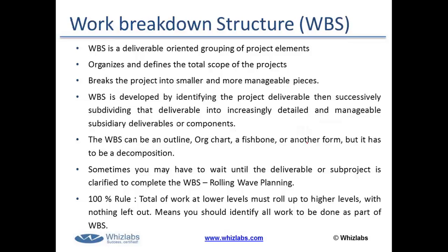Now, the construction work can be further broken into, let's say, construction of the ground floor, construction of the first floor, construction of the third floor, and so on. The decoration work can be broken down into interior decoration, exterior decoration, right? Then the construction of the first floor can be further broken into construction of the pillars, construction of the walls, construction of the floor, fitting the windows and the doors, etc.